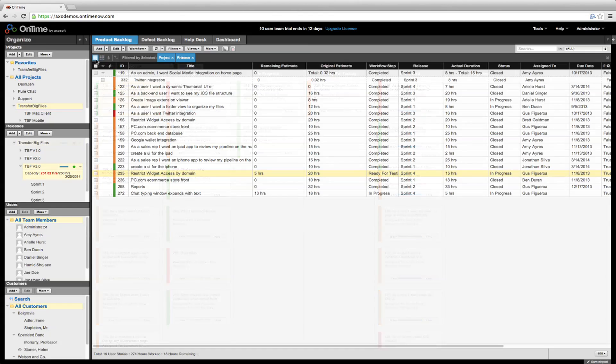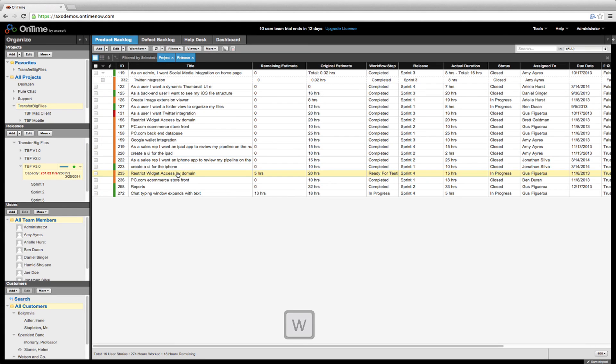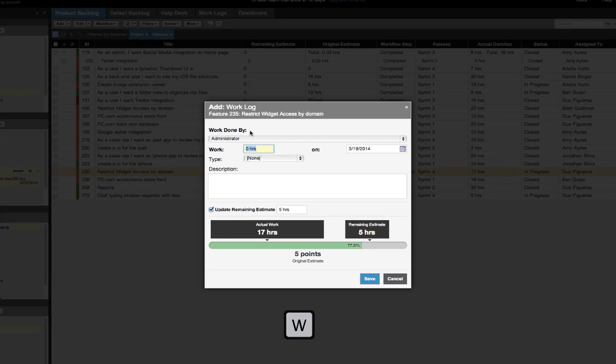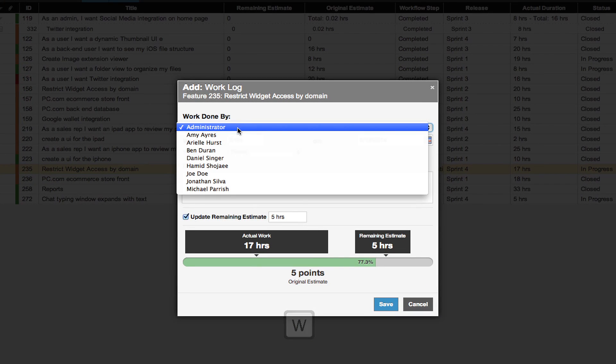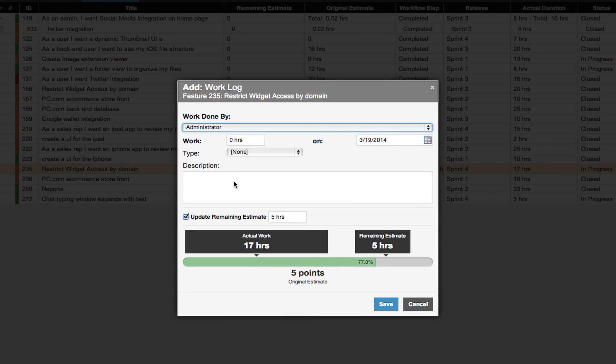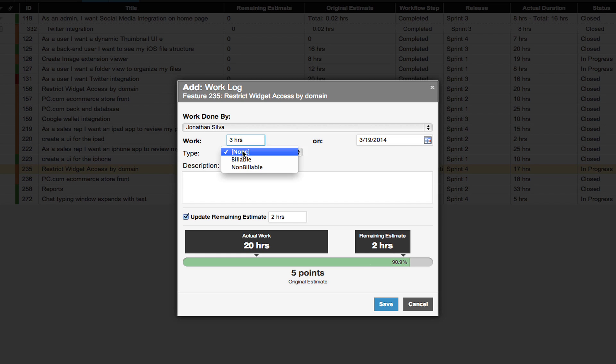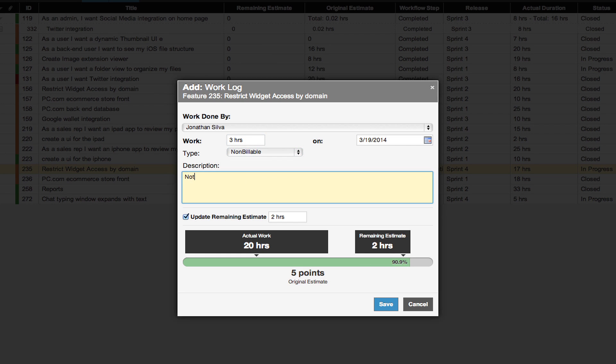When logging time spent on your work, you have a few options. The easiest way is to use our keyboard shortcut W with the user story selected. Enter your work log by assigning the entry as billable or non-billable, along with any pertinent notes.